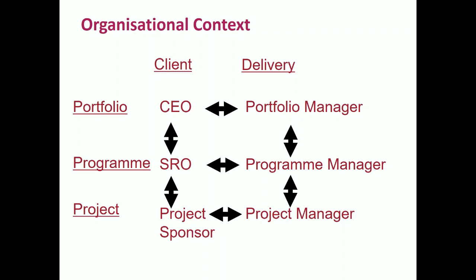And just think how much concrete was poured at the Olympic Park. At program level, we set up 2 concrete batching plants, and the project managers were constrained. They could only order their concrete for their projects from those batching plants. The project manager was not accountable to the project sponsor for how he delivered the venue. He was accountable for what he delivered.